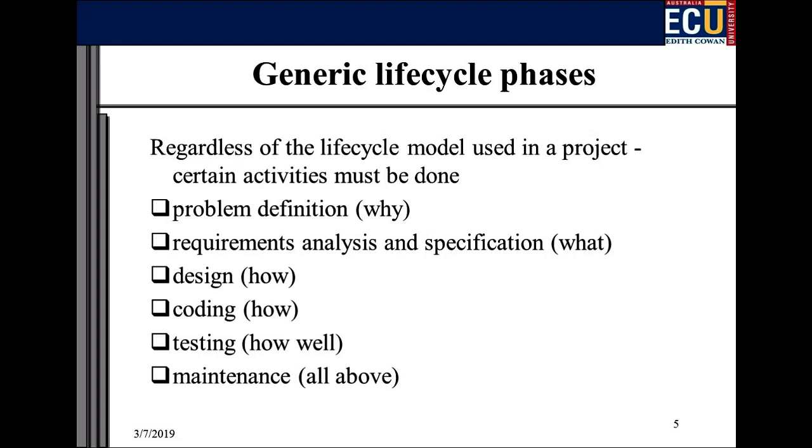They have some component of iteration, which means you build something, you show it, you get feedback, you make it better, you iterate to build the same thing but make it better and better, and are incremental. In other words, you're building this functionality, focus on the functionality, iterate over it, and then say, okay, that's good, move on to the next functionality, and that's your next increment. You build the software up bit by bit.